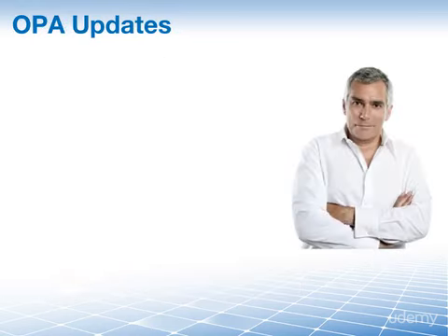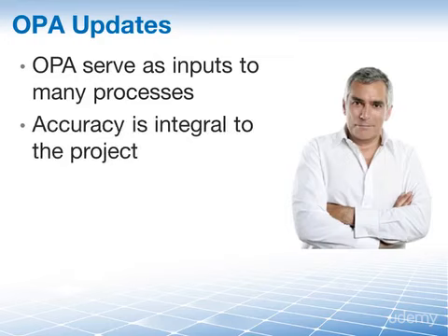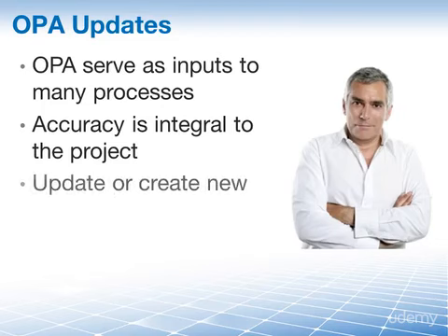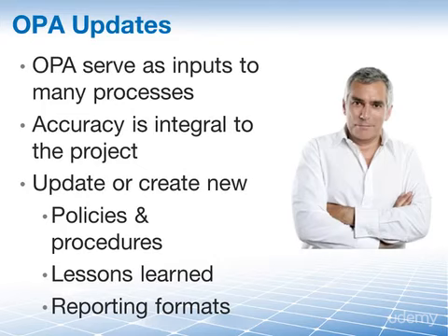Organizational process assets serve as inputs to many processes. That means their accuracy is integral to a successful project. Failure to update them in a timely manner will have significant negative impact on the project. As you control communications, it may be necessary to update existing assets or create new assets. For example, you may update policies and procedures. You may update lessons learned databases or reporting formats.